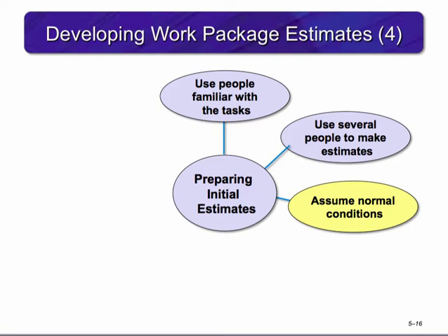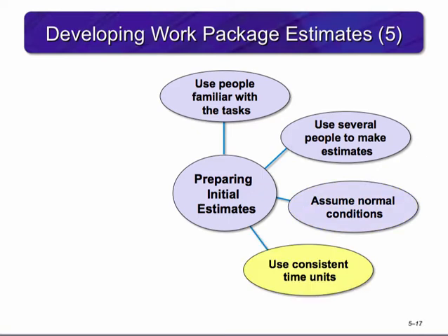For instance, is a normal workday 8 hours? Are there normally 2 or 3 shifts working? Whatever the normal is for the organization should be used in determining an estimate. Specific time units should be used and should be selected early in the development phase of the project. This might be minutes, hours, days, weeks, or months. Whatever unit is decided, be sure to use it consistently.